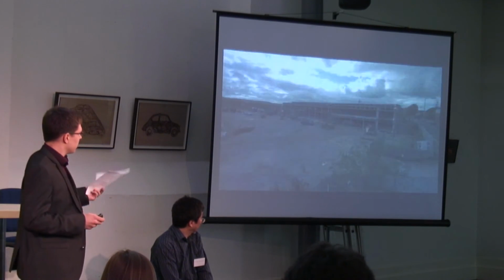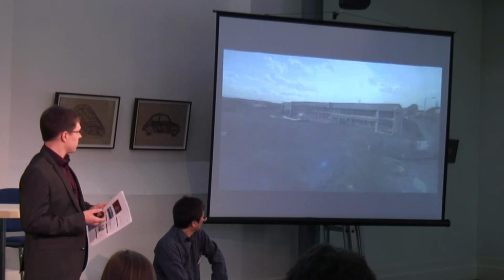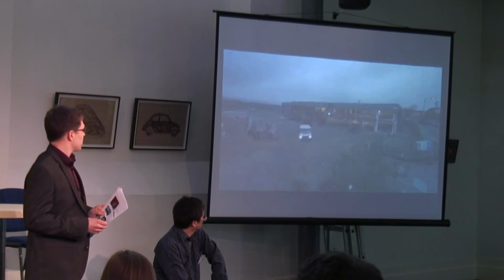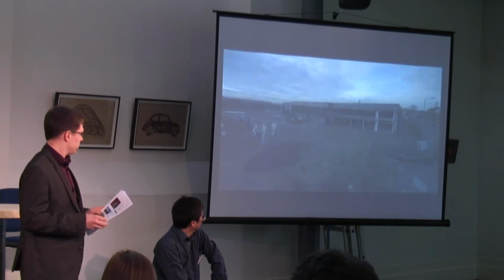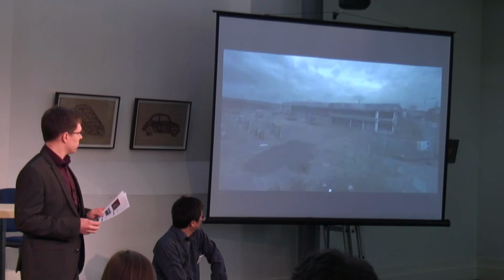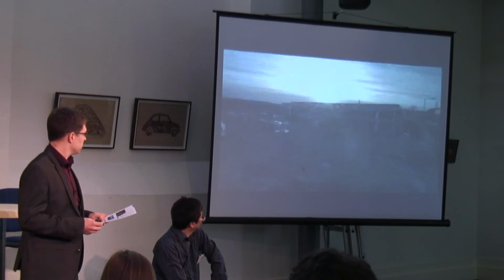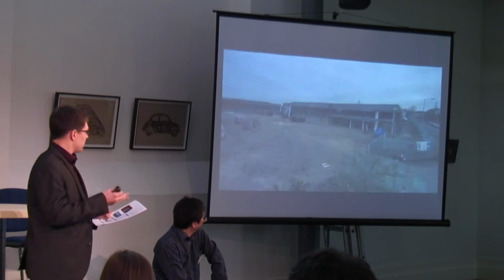We were on site digging foundations, having only tendered the foundations, steelwork and cladding, so all the rest had to be done whilst they were digging. Whilst they were building, there was a complete catch-up with all the design production information, all the tendering, all the cost planning, everything. So there was a real need to speed this up.